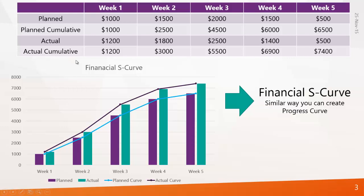Here I have given an example. Let's assume there is a project that is five weeks long. You have a plan to spend $1,000 on week one, $1,500 on week two, $2,000 on week three, $1,500 on week four, and $500 on week five. The cumulative will be $1,000 on week one, $2,500 on week two, and it goes on to make $6,500 on week five. So your total budget of this project is $6,500.